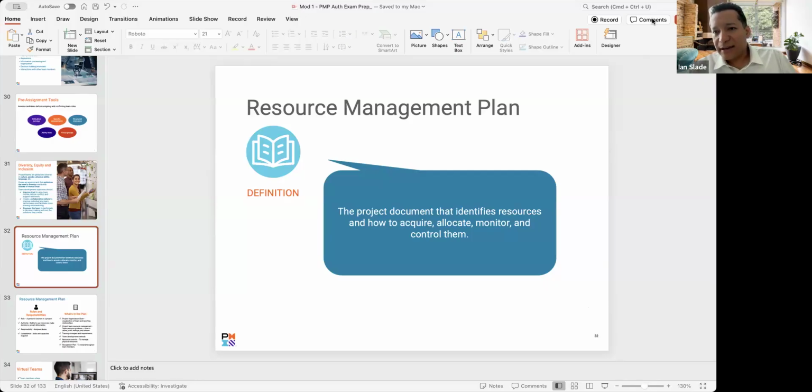So let's break that down. The people whom Nikki gave tasks to: get the flowers, invite people, find a location, this, that, or the other. All of them would have what letter in the RACI chart? R, right? Because they're responsible for a task, which starts with the letter T. All of them are responsible for a task. So if there's a task assigned to you, you're responsible, and you're included in the resource plan. Does that make sense?